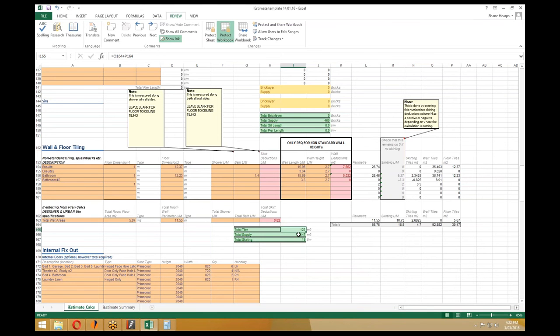So it's saying total 123, 147 square meters would be our supply, which would be our wastage factor, and 19 millimeters of skirting. Now, the supply factor, we allow Beaumonts to calculate the tiling themselves. We essentially just use this as a reference point for checking their quantities for rooms and checking their overall supply.